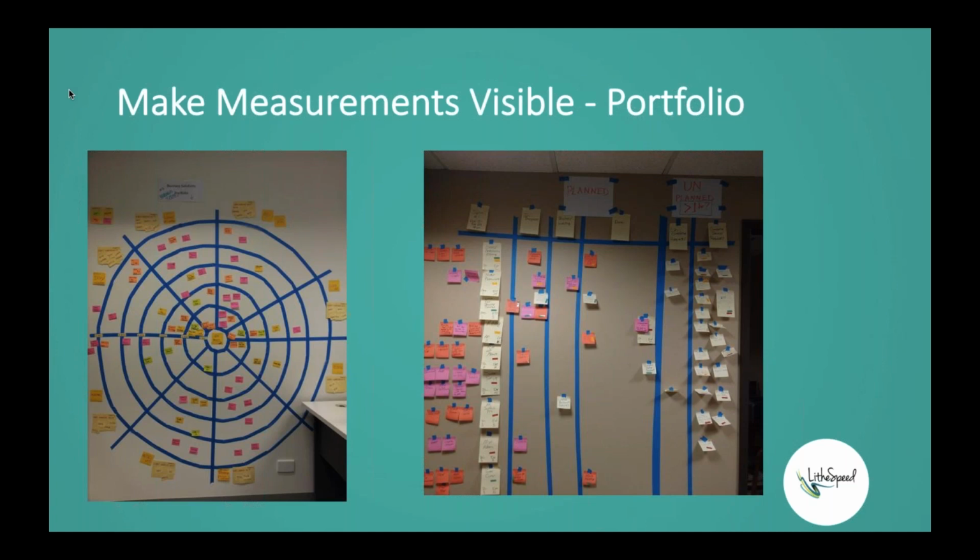And this is a huge problem I see in most of the organizations that we work with from a portfolio standpoint. Way too many projects, not enough people to support them all, and they're all inching along. The organization is spending huge amounts of money, but not actually delivering very much. So I like to use this tool on the left with our portfolio managers to show them in a very visual way the projects that are coming and the timing around those.